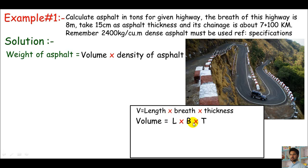Volume equals L times breadth times thickness. The length is given in chainage form: 7+100. The 7 means 7 kilometers, so I'll convert 7 kilometers into meters by multiplying 7 with 1000. This converts 7 kilometers into meters. Then I'll add 100. This is the total length in the formula. Breadth is 8 meters. Thickness is 15 centimeters, which is 0.15 meters.